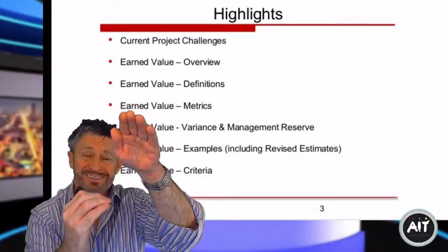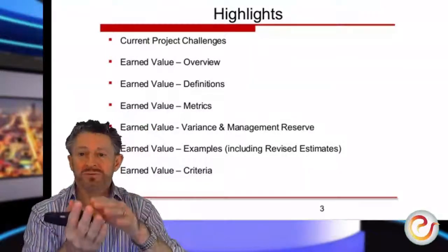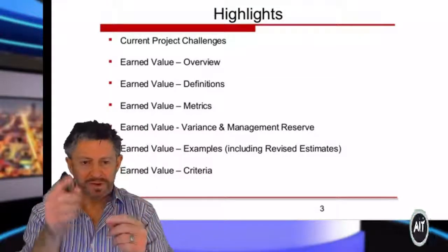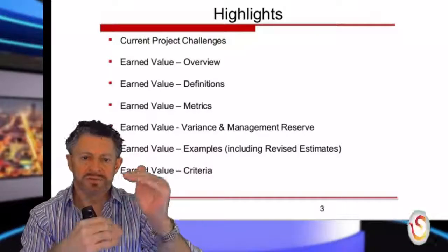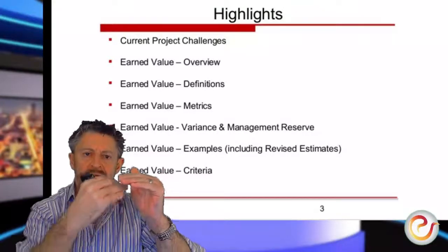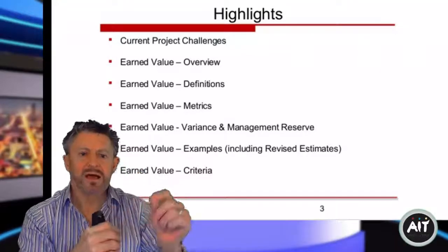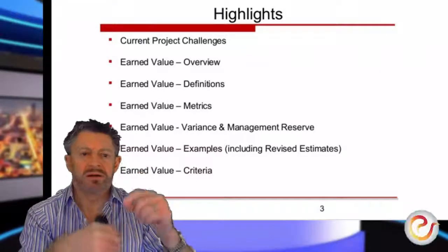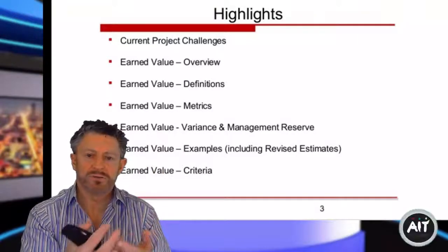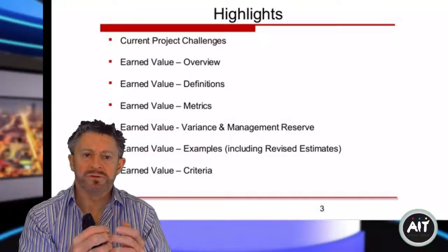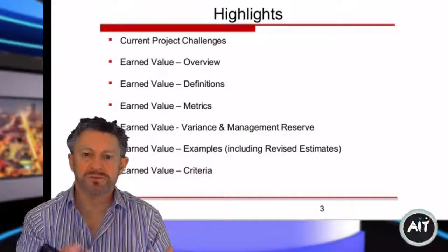Do you follow those sums? Yeah. At the end of the week you can go back and say, what happened? Monday and Tuesday I was on target. On Wednesday I went off. I need to investigate why I spent that extra 150 euros on Wednesday. And you probably find there was a bill or some other expense that I had not planned or budgeted for, or my original estimation was that it was 200 euros, but it actually cost 350 euros.